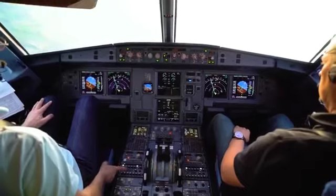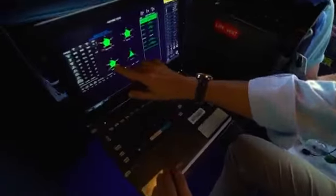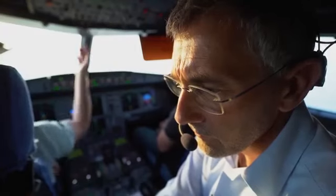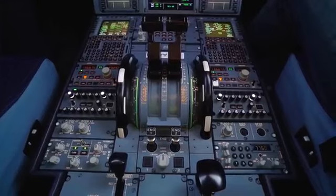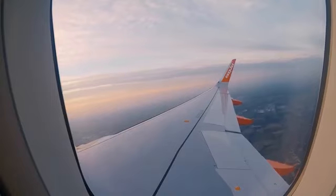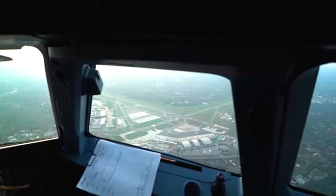The tests are the last major milestone before the plane is handed over. If everything goes smoothly, the airline will take receipt of the aircraft the following day. This is carried out officially with the transfer of the ownership rights, the so-called transfer of title. Before this, the airline pays the final installment of the agreed purchase price.